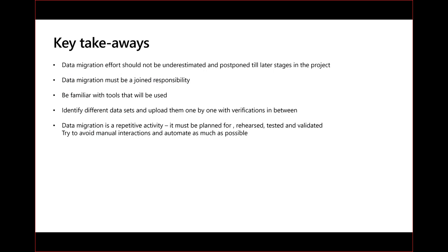And you need to know that it is a repetitive activity. So it needs to be showing up in your project plan that you have multiple iterations of your data migration. It needs to be rehearsed. The data that is uploaded needs to be tested and validated, and typically you expect that the first run will have some major issues, so you will have to rerun it a couple of times before you will get a data set that is acceptable.